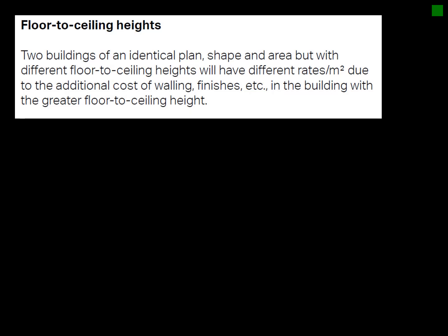Then the other thing that I'm just going to highlight, a few things that you can also look at. Your floor to ceiling height also has an influence, or your square meter rate might not always be relevant to a new building, because some buildings may have a double volume type of installation. Your floor to ceiling height might be lower or higher, which will influence the cost, etc., etc. So it's just a discussion on that.